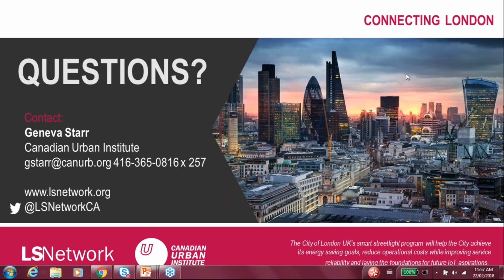Yeah, we're looking at a 2-year program. So first year we will complete our major routes and our secondary roads and streets through the city. While we're working on the first year with LED lanterns and the new CMS, the Smart City system, we will be reviewing all our smaller streets, our little alleyways and footpaths, and looking at exactly the type of lantern and, more significantly, the type of lighting levels and the colour temperature of the lanterns that we're going to put in there. So we'll be ready then. We complete the first year of the installation, and then for the second year we'll be doing the more niche areas, but we are looking at definitely completing in 2 years' time.